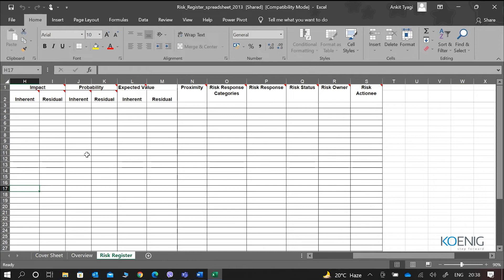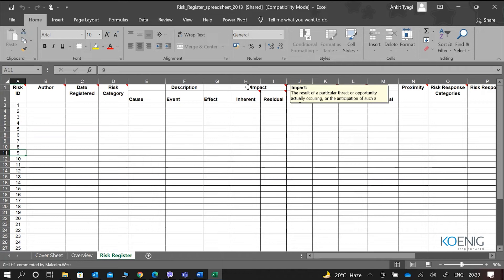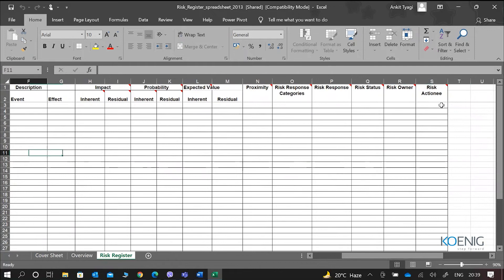The difference between risk owner and risk actioneer is that the risk owner has the overall responsibility for the risk, whereas the risk actioneer is the one responsible for implementing the response plan. Only implementation is the responsibility of the actioneer; everything else is taken care of by the risk owner. Other information in the register includes the author, date registered, category of risk, and cause-event-effect. The key information kept in a risk register is impact, probability, expected value, proximity, risk response categories, risk response plans, and who is the owner and who is the actioneer.